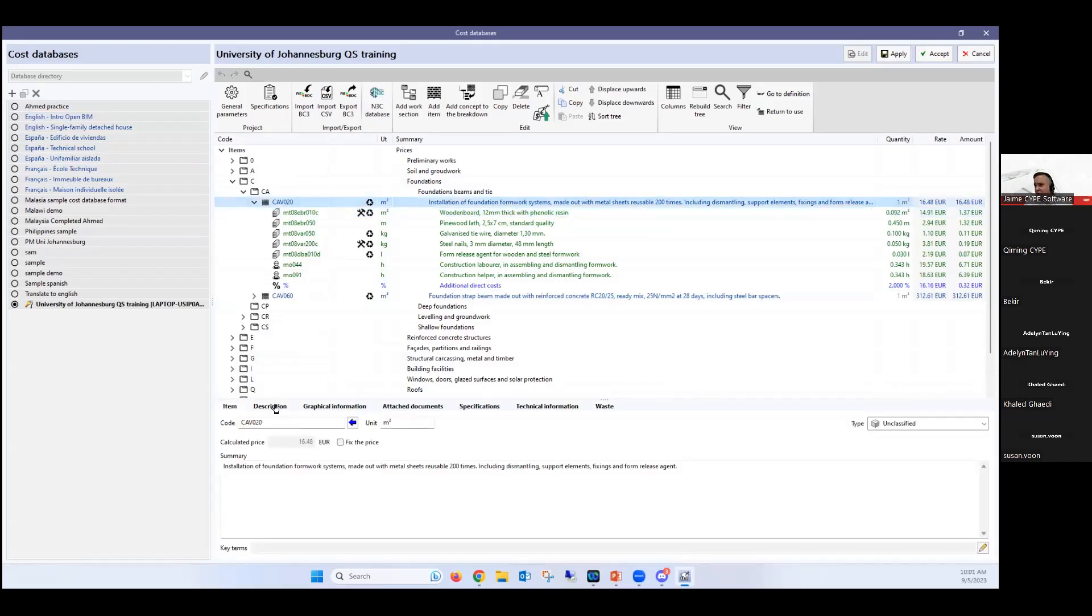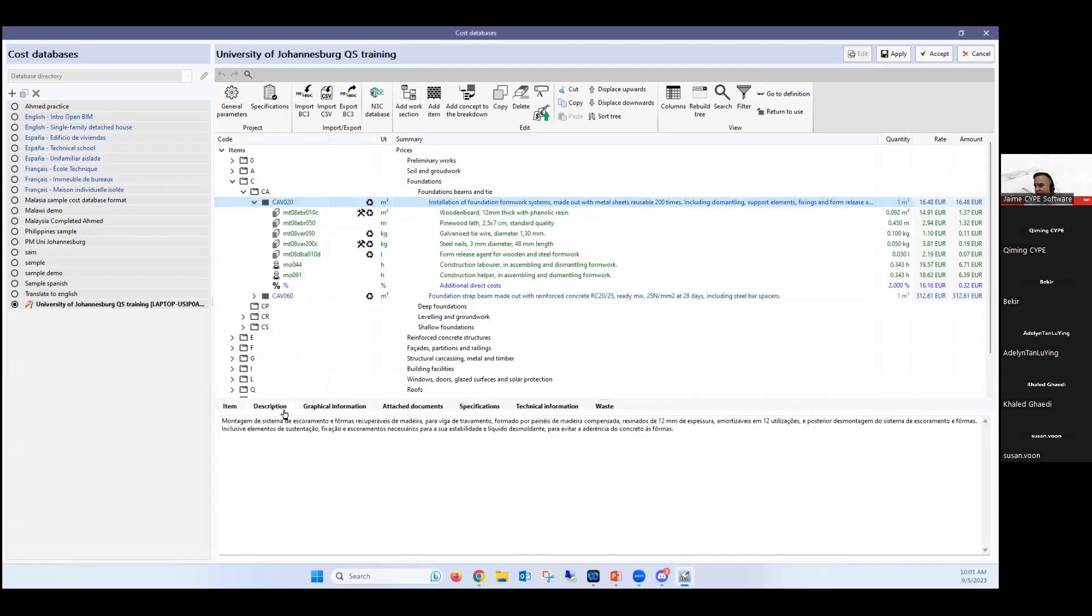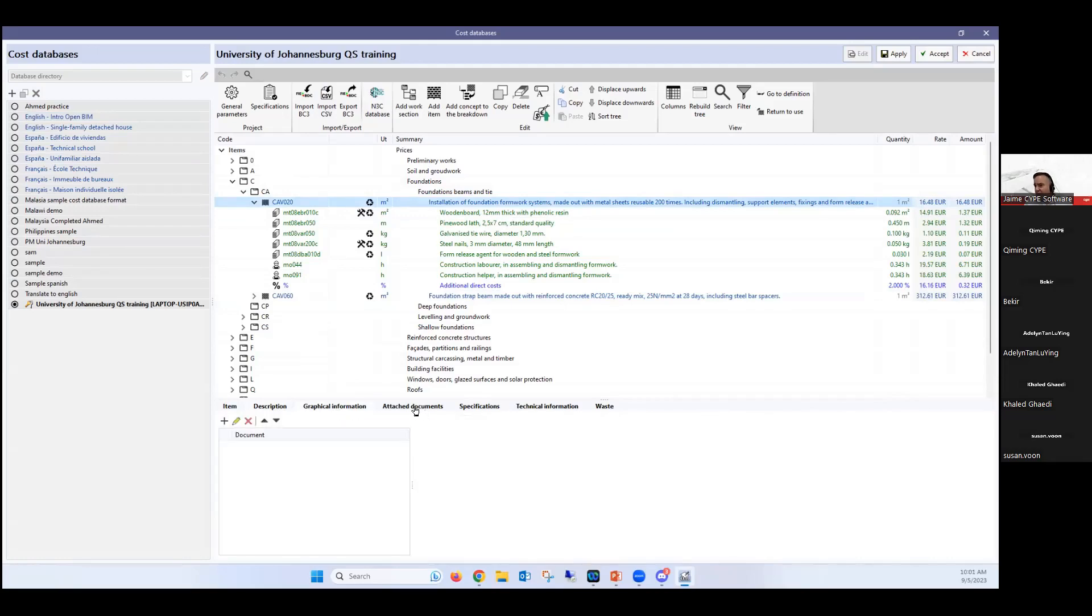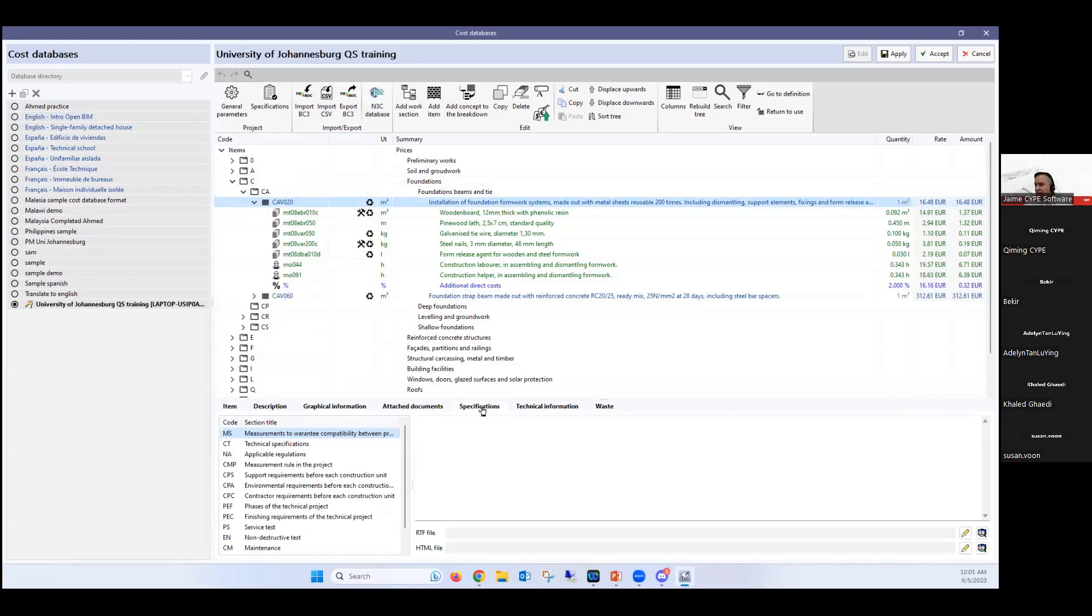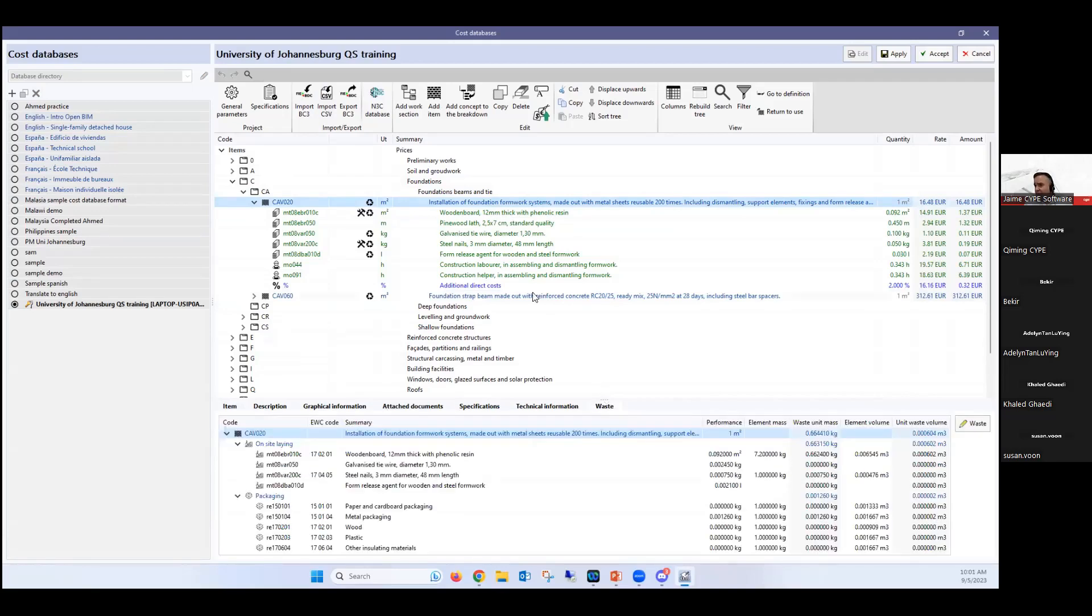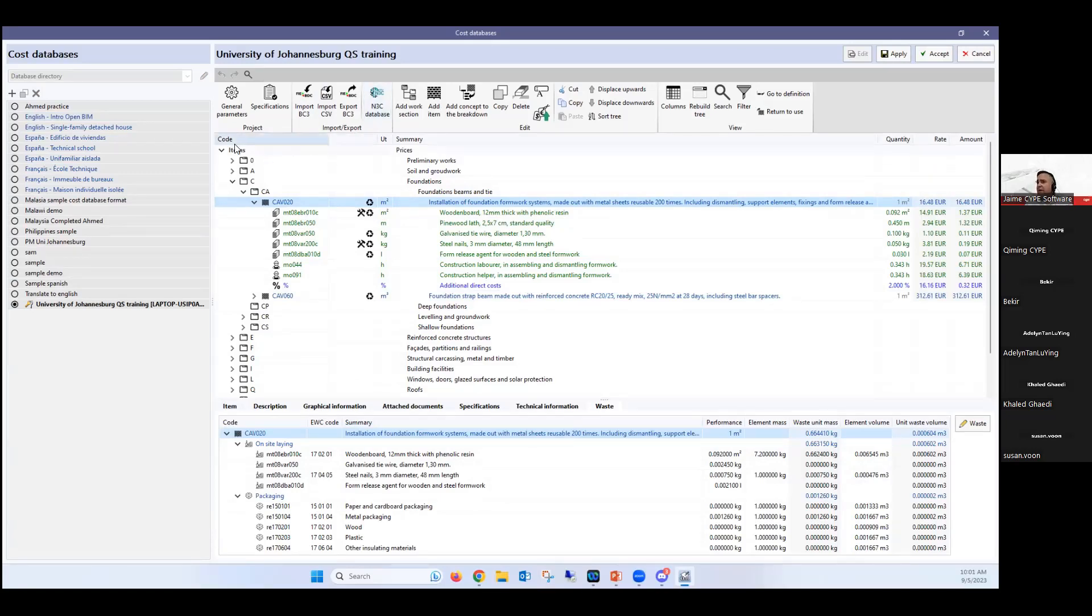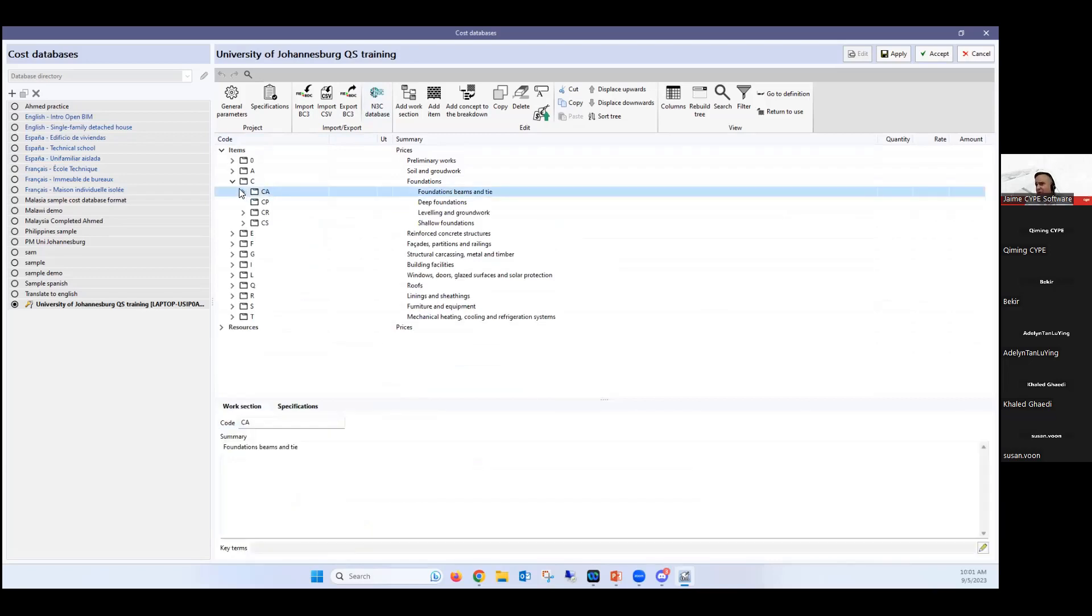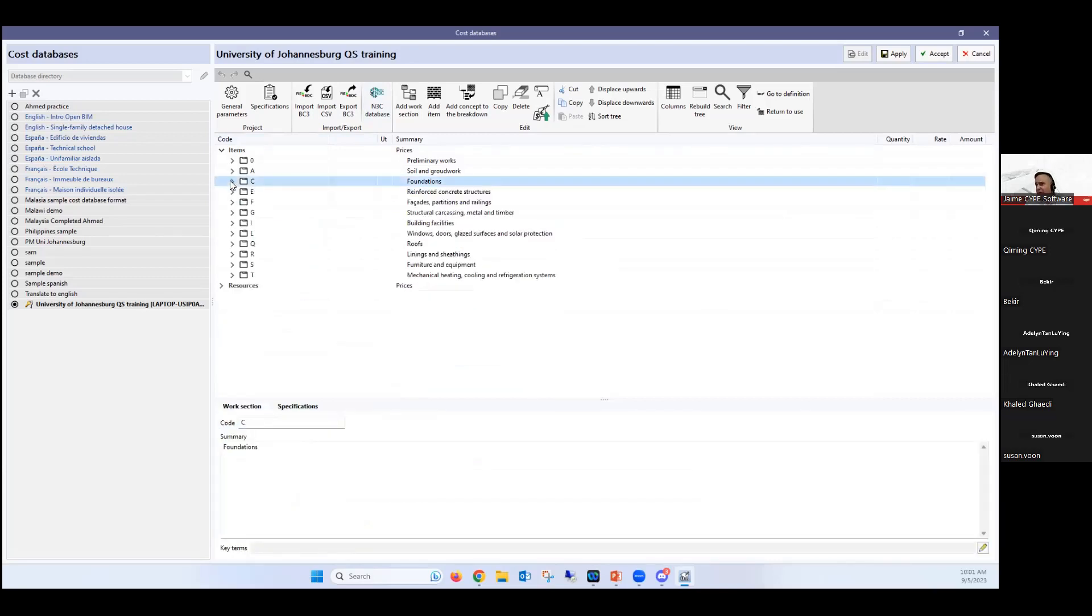Our program can also take into account, if you see here in these particular bunks, we could take into account concepts such as waste generated. And you see here in the bottom, for example, for this item, we have a description of the item. We can have graphical information. We can have specifications, also technical information, which is right now each time being more and more important, like the physical properties, environmental data, and also the waste generated. As you can see in this item, which is just the formwork, I'm generating this waste from on-site laying and this waste from packing, and I can have the program take all this into consideration. It's quite simple for you to enter information and create a cost database. And once you have it, you can just always keep expanding it more and more.